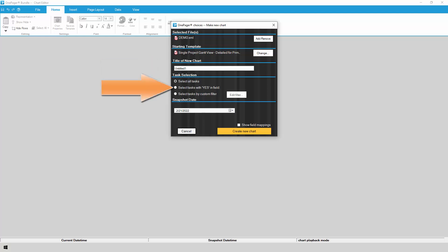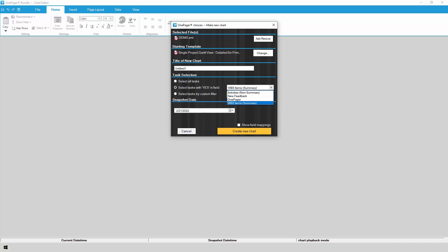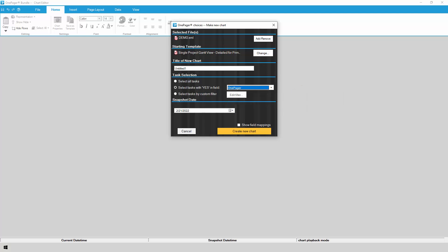This section allows you to control which activities from Primavera P6 should be included in your OnePager chart. If you click the dropdown, you'll see several choices. OnePager can automatically bring in any activities from P6, which are the child tasks in your schedule, or it can do the opposite and bring in only WBS items, which are useful if you want a higher level summary. In our case, since we set up a user-defined field with Yes values specifically for OnePager, we'll choose that.